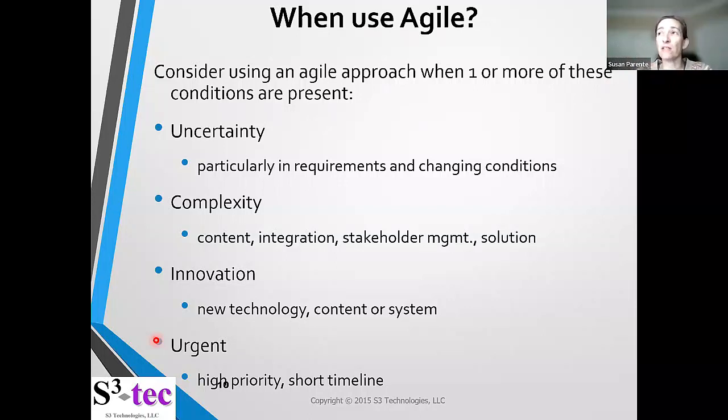In a traditional project, if I was doing a course update, I might do the update in such a way that, okay, let me update all the assignments for the 14 weeks. Let me update all of the discussions for the 14 weeks. Now let me update all of the course readings for the 14 weeks. But by doing an Agile approach, where I was doing it in increments, I actually took the increment based on when the course weeks would actually go live, and each week a new week of the course would go live, and I did my development that way.